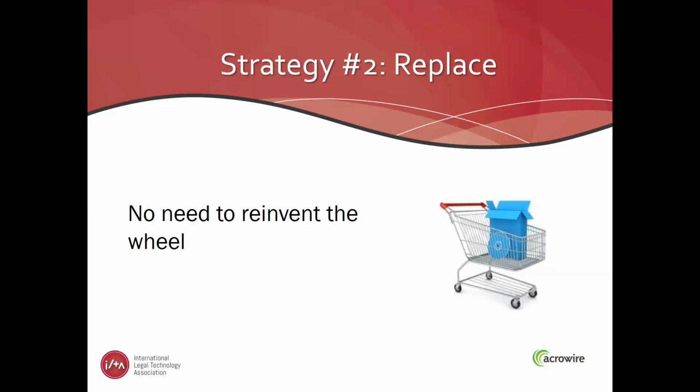90% of the work done using this methodology ought to be done before the purchase is made, not after. You can keep your costs in check through ensuring, through that proof of concept, that the application can easily fulfill all of your needs and that the licensing model remains acceptable to you even if you see more than expected growth over the lifespan of the solution.